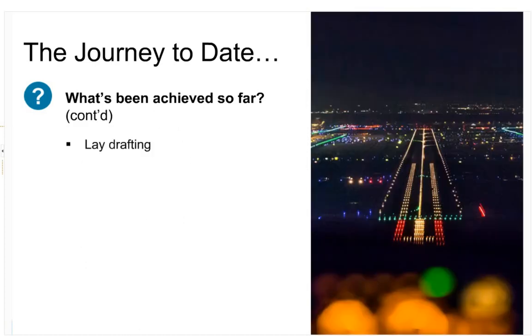And this then led into what we call a lay drafting process, where we basically marked up a Word version of the regulation and MOS and then tabled it as a project team, and we worked together on various solutions and technical updates. This then led to the formal drafting by Office of Parliamentary Counsel for the regulation and internal to CASR, a revised draft of the Part 139 MOS, and that work was largely completed in July last year.